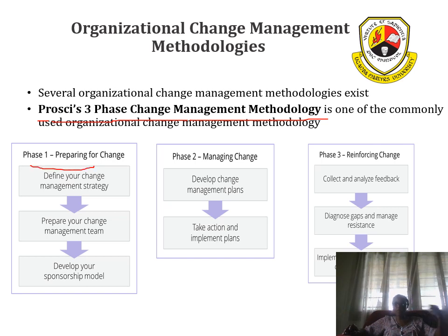Basically, if we go back to our previous slide, preparation talks about planning. So in this stage, we define where our change is going to happen, what is going to change. We prepare for our change management team. We determine who our change management team is going to be. We develop our sponsorship model. That means who are the change management champions? Who are these going to be? So this is basically the planning phase.